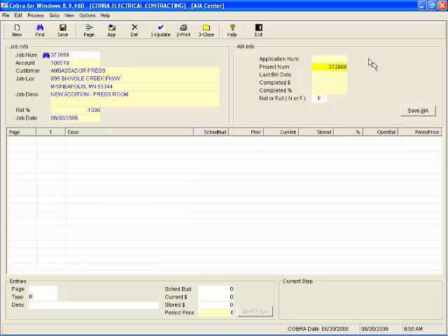But either way, as I press enter, I'm brought down to that retainage field, and again, this is coming off of your defaults. The difference is that with full retainage, the retainage is billed out with each bill, although you're expecting back less the retained balance.